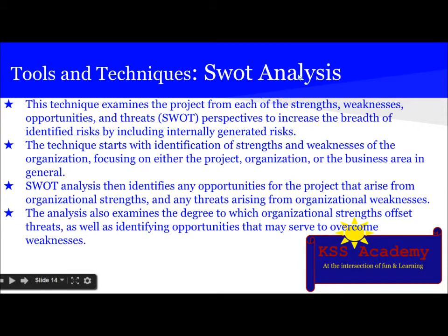The next tool and technique used is SWOT analysis. This technique examines the project from each of the strengths, weaknesses, opportunities, and threats perspectives to increase the breadth of identified risk by including internally generated risk.